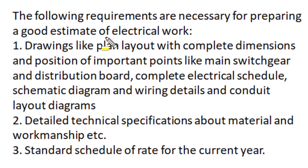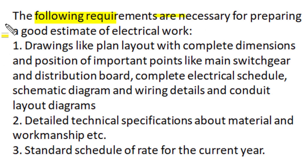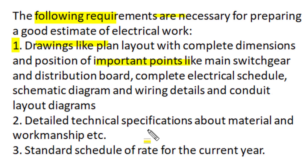An important question is: what is required to prepare a good estimate for an electrical work? The most important is a drawing plan which has the layout and position of all important points like main switchgear, distribution boards, control points, and position of electrical points.